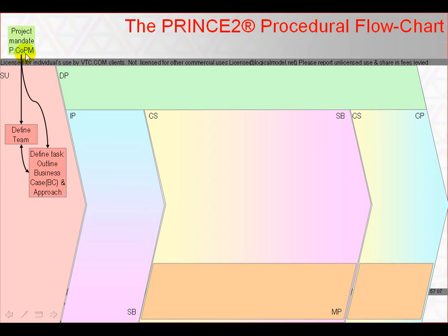The official manual says that since it is created before PRINCE2 is in use, its content and format are undefined. Whatever and however it triggers the project, it must as a minimum be capable of allowing those involved to appoint the project executive and the project manager. It must also support exec and project manager to start to engage a team appropriate to the results required. The desired results and the intended approach to achieve them are described in as much detail as compatible with being swift and cheap, while we don't yet know how well this idea stacks up. The results of SU's 6 activities is a team and a plan for the initiation stage.